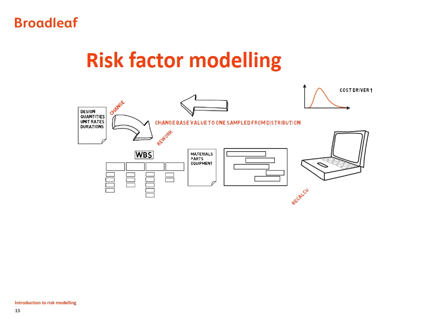We can choose a value from the distribution and use it to vary the estimate just as we did for what-if analysis. Change the input, rework the estimate, recalculate the total. One of the values for the uncertain cost driver will produce one value for the total cost. We can sample the uncertain input repeatedly and calculate the effect on the total repeatedly. By the time we have sampled lots of values from the input distribution, we will have built up a simulated distribution of the total cost.